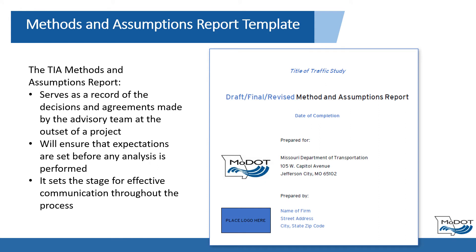A TIA Methods and Assumptions report serves as a record for the decisions and agreements made by the advisory team at the outset of a project, will ensure that expectations are set before any analysis is performed, and it sets the stage for effective communication throughout the process. The intent is for this report to be updated as methodologies and assumptions change during the project, and it can then be referenced and appended to later project reports.